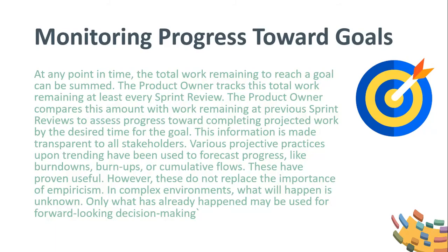Various projective practices upon trending have been used to forecast progress, like burn downs, burn ups, or cumulative flows. These have proven useful. However, these do not replace the importance of empiricism. In complex environments, what will happen is unknown. Only what has already happened may be used for forward-looking decision-making.